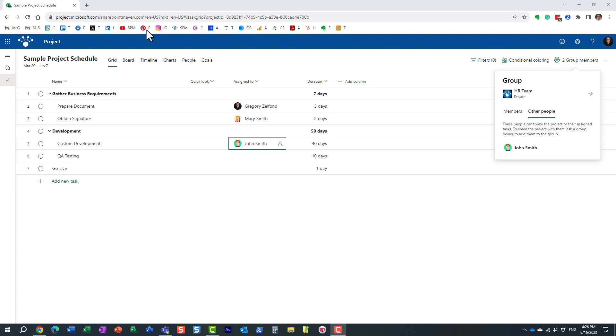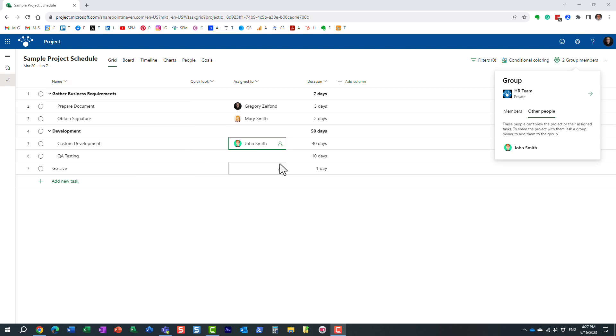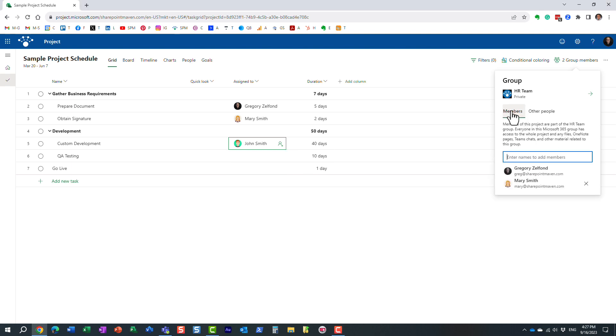And here is a really important part, and it kind of states it here in fine print. Because I did not add John to the group, he cannot really access the schedule. He cannot see this project or his assigned tasks. It's just really a way for me to track the assignments. But if I do want John to be a team member and be able to access the schedule and collaborate and access other assets as part of the Microsoft 365 group, I would need to essentially add him as a member of the group.